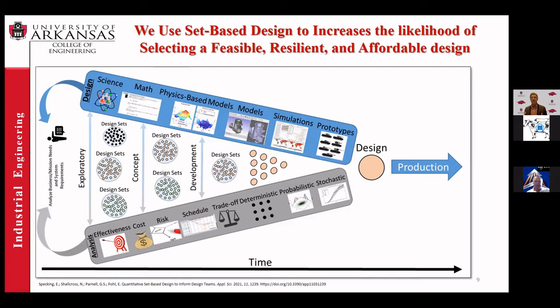The big 4 qualities of set-based design are: 1, you consider a large number of designs; 2, you allow specialists to consider a design from their own perspective and use the intersection between those individual sets to optimize the design; 3, you want to establish feasibility before you commit to a design or a design decision; and 4, the whole process should be a concurrent engineering process to provide improved stakeholder value through extensive uncertainty resolution and improved alternative design.